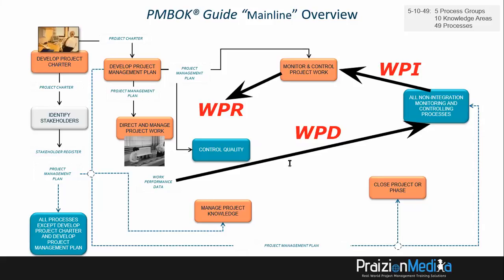So, work performance data. You're going out with your team, and there's a team building exercise to go to a particular ridge for a hike. You love to hike. So, as you set out on the hike, work performance data comes in. What is the work performance data? Traffic on the I-10. That's work performance data. It's a raw observation. Oh, there's traffic on the I-10. But that data is not good enough. That data needs to be analyzed. That data needs to give you actions to take.